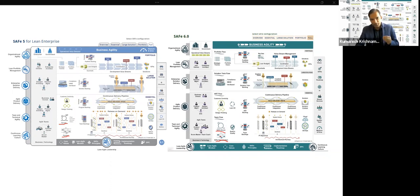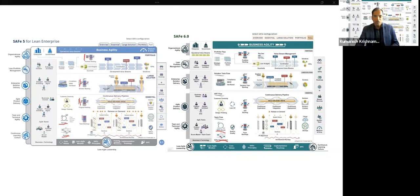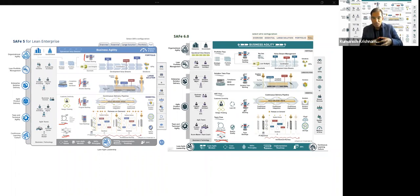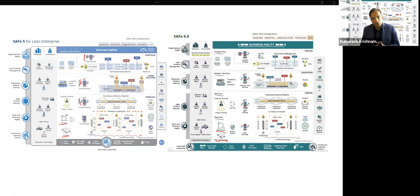Another evident change is that the vertical Kanban boards shown at the program backlog, solution backlog, and portfolio backlog in the previous version have been removed in SAFe 6.0. The intent is that instead of calling out Kanban in different places, SAFe wants people to understand Kanban as a process understood at one single location, structured in one place rather than scattered across multiple areas.